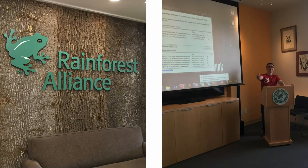So then a lot of the cards that were super important to them at first suddenly became, well, let's get that out of the first 6 sprints. So we were really able to focus on the most important things that could fit in the first 6 and kind of give ourselves some room, because if there was more time to do things, we could start pulling things from that kind of overflow of cards.